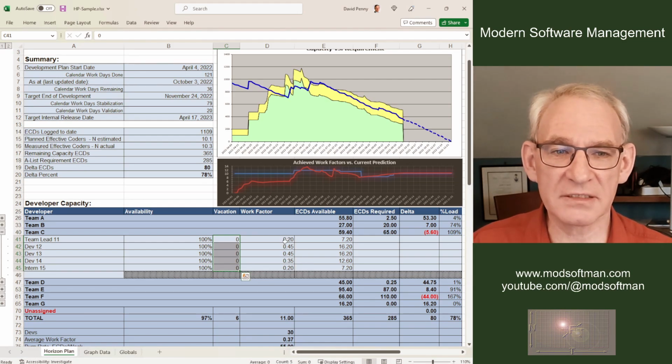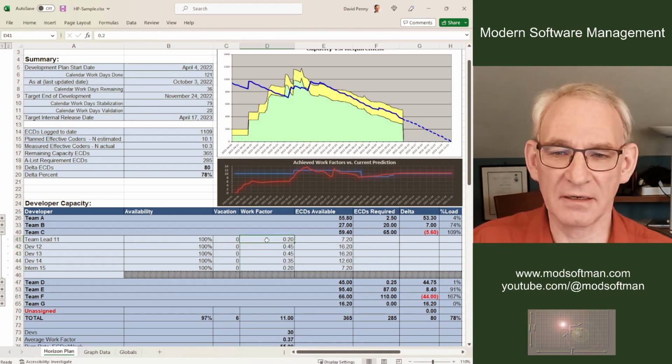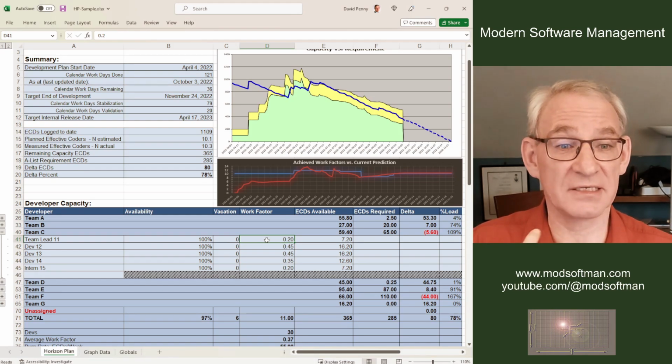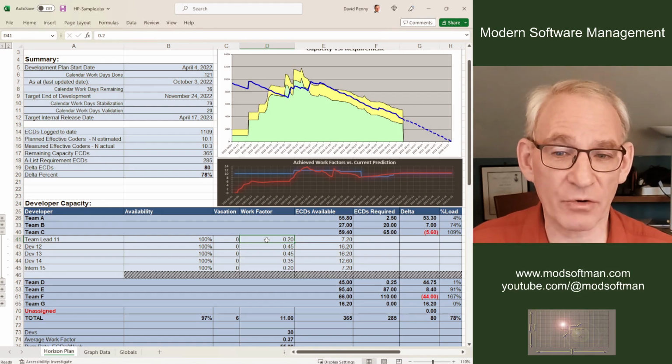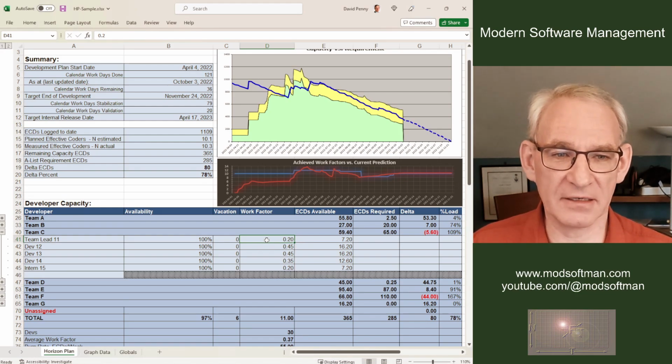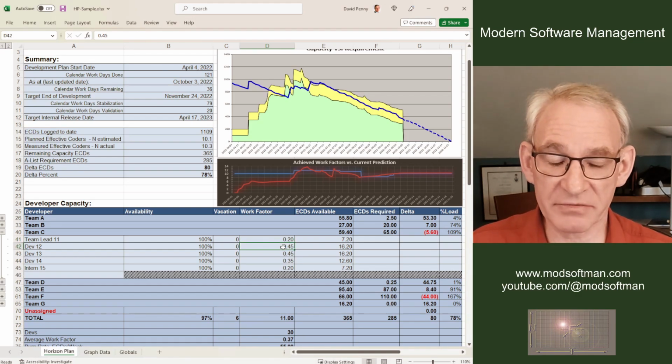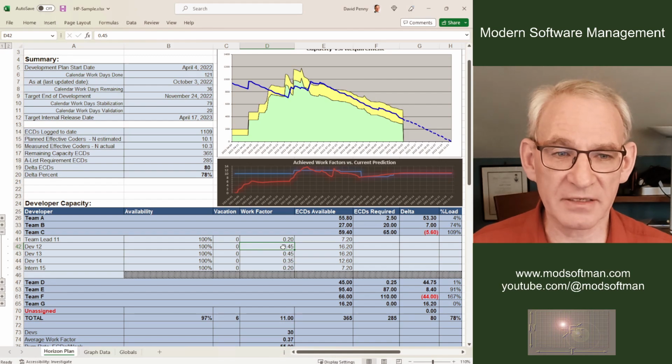And so the units, ECDs per workday. So the team lead expects to do 0.2 ECDs per remaining workday. So 0.2 ECDs times 8 is 1.6 hours of dedicated coding. And because they're a team lead and they do half managing, half coding, and half helping out other people, they may be relatively lower. Often upper management will question these numbers. Well, they're only working 45% of the time.